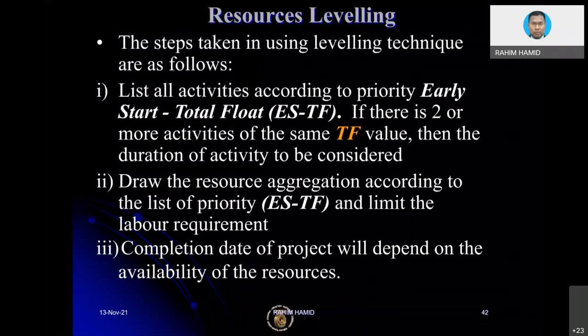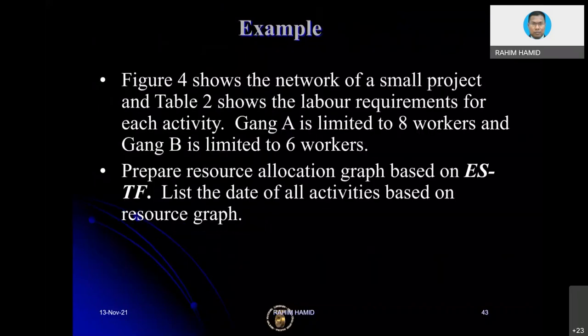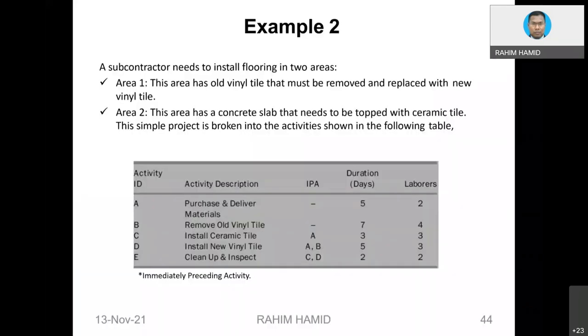Okay, let's go into the step by step. The steps are very similar to resource smoothing. We need to do the listing based on early start and total float, and then listing based on the late start and total float, etc., etc. And we do the resource leveling, and then at the end of the day we are going to see how the resource graph looks like, but then we are going to level.